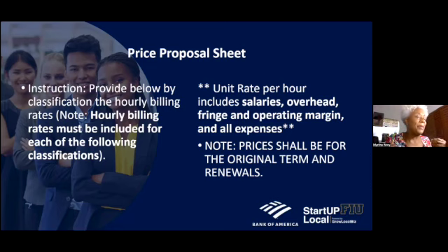So project management, for example, if the range goes anywhere from, I don't know, 35 to 55, that's the range of somebody's experience. So you always try to go with the highest middle, because if you can find somebody at like $40 an hour that is just as equipped and just as experienced as that person that was 45, just do the math. This is the extra money that you can have.